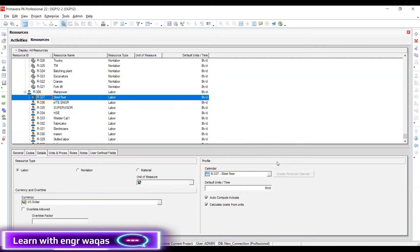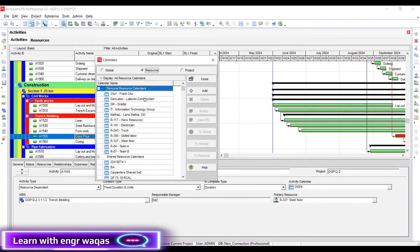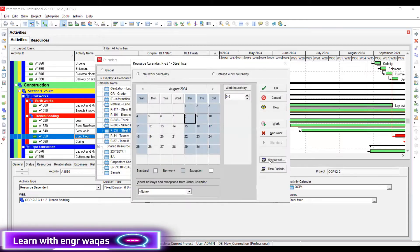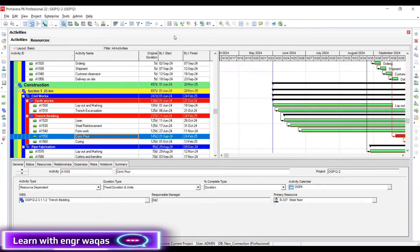It is now 145. If I change something — going to Enterprise, then Calendars, then Resource Calendars — where is my steel fixer? Here I can find that calendar. Modify, go to work week. Let's say Wednesday is also off. See the change — now it is 404 days. This is a real example: 404 days it will require to complete that work because my week is only two days.